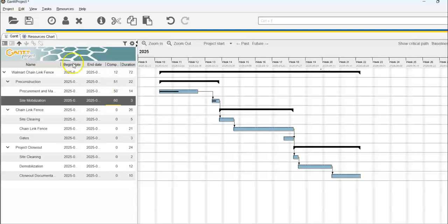So you would save this as progress as at whatever today's date is, and then next month you would do the next version of this and you would change all those percentages and it would give you a completion percentage over there. So all of these things do tie in together, and just like fence drawings, being able to do these kinds of things for commercial clients is really going to set you apart from all the competition. So this is a really good thing to be able to do.